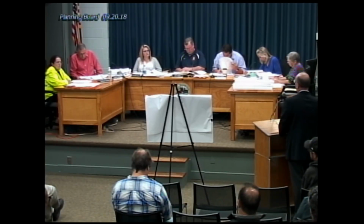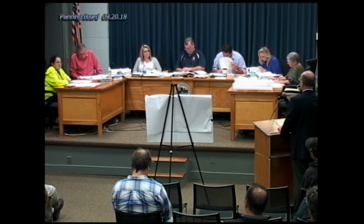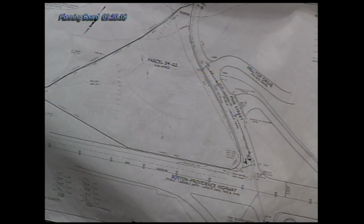Also, the School Meadow Brook is just about 200 feet from this piece of property. It sort of runs diagonally away from this property and then behind the Iorio Arena. So we have a little bit of this property that's within 200 feet of the School Meadow Brook. Again, that doesn't mean that we can't alter that area, even though we're not proposing to alter any of that area, but it would just mean that we would need a permit from the local Conservation Commission.